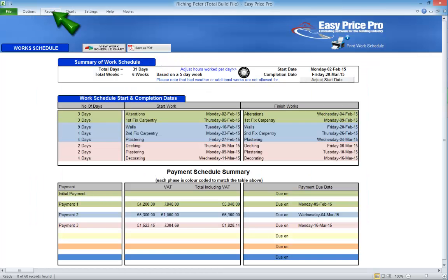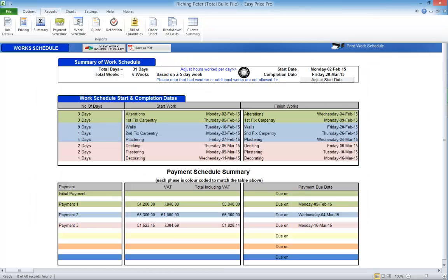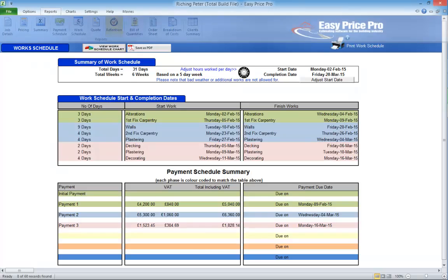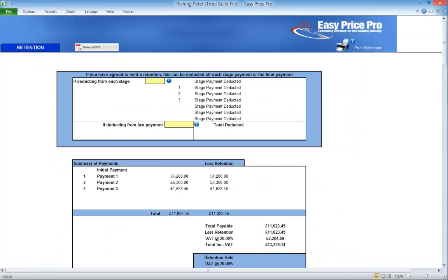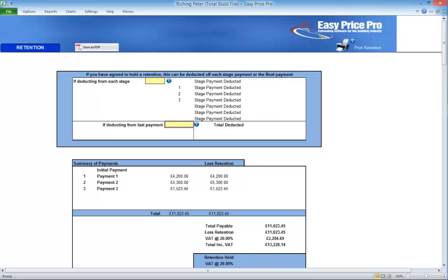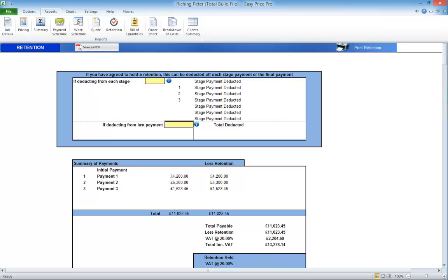If you're going to include a retention, use this report now. When you've checked the summary, payment schedule, work schedule and added any retention, you're ready to generate the written quote.